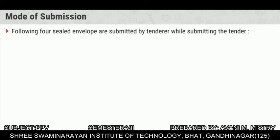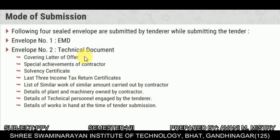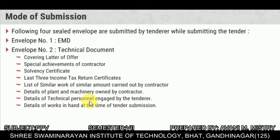Mode of submission: tenders are submitted through envelopes. Envelope number 1 is for EMD (Earnest Money Deposit). Envelope number 2 is for technical documents, including the covering letter of the offer, achievements of the contractor, solvency certificates, last three income tax returns, list of similar works carried out by the contractor, details of plant and machinery, details of technical personnel engaged, and details of works in hand at the time of tender submission.